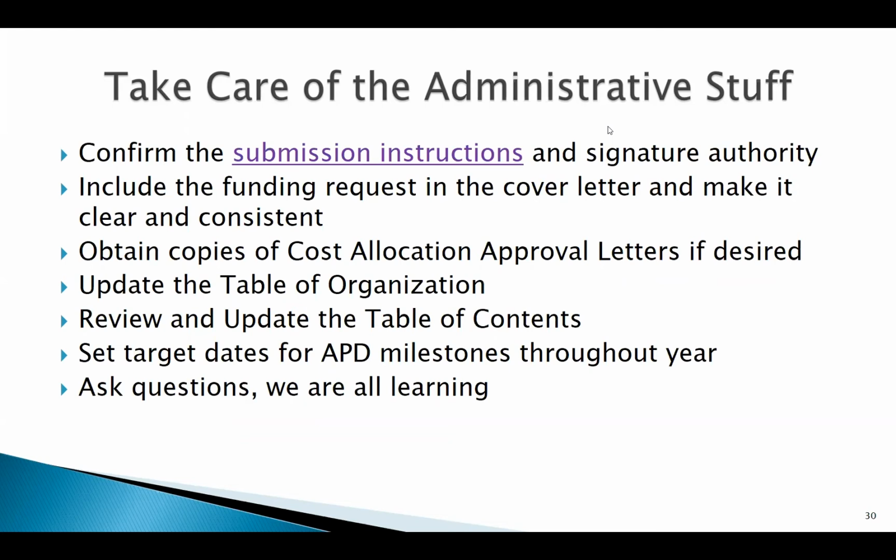Again, our suggestion to you is to set due dates for various aspects of your APD throughout the year. If you only have that target date for right when it's due or a month when it's due, you're probably going to run into problems. So stepping back and saying, what do we need to get accomplished in this next year, and where is there a natural fit between the due dates or some of these artifacts that I need to get for my APD, and how can I spread that out throughout the year.